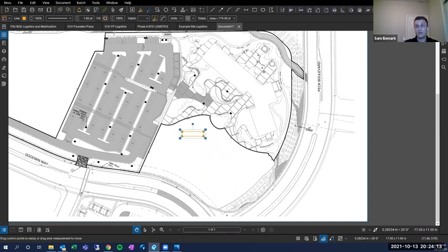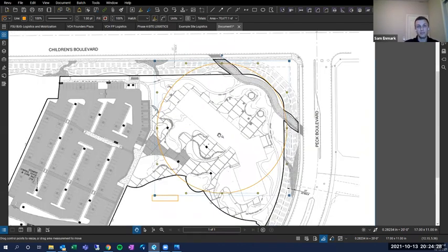And Jaime, you can do the same thing if you have a crane swing path here. So you can do the sketch to scale. If you know what your crane's radius is, you can draw this in at a 150-foot radius, and boom, I've got the radius that is going to reach. And I know that if I set it where I set it, I'm going to have a problem hitting this side of the building with my crane. So I'm going to delete that.